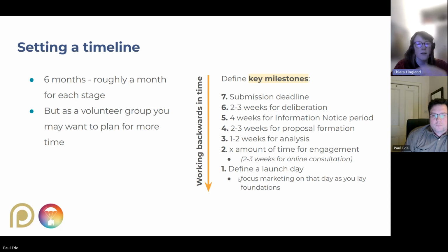So you can see it's helpful to start from where you need to have it submitted, and work your way back. There'll be things that push and pull that programme, but what we'd recommend is having that in place, as it really helps you stay on track. So coming back to that question about how do I stay on track, having this, trying to stick to it and reference it in all steering group meetings can be very helpful. Next slide, thanks, Paul.